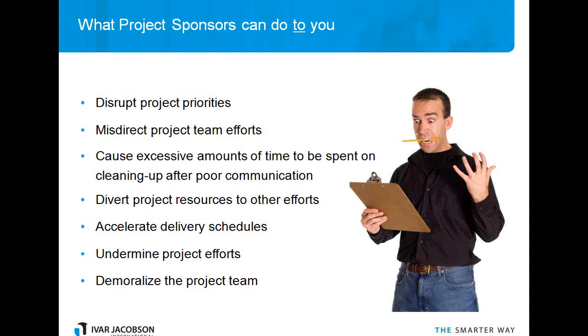One of the problems too with project sponsors, especially on an iterative project, is that they can have a tendency to accelerate the delivery schedule. If they see a prototype or early results of an early iteration that they like, it may look very good, but there may not be the real processing, the real software running behind it all the time. They can interpret that as, oh, this looks good, let's go ahead and roll this out.